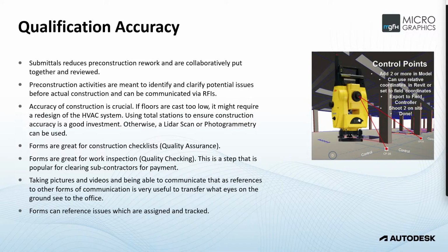Right, then qualification accuracy. So within the Build platform, the process would start off with a submittal. The submittal is documentation that you put together. So let's suppose you wanted to install floor tiles, and the floor tiles are a certain marble, and the marble has to be installed in a specific way, and you need documentation from the supplier, and you need to have buy-in from the owner, and you need everybody that's involved with it to put all the information necessary onto that submittal. Then that is how you would typically start out.